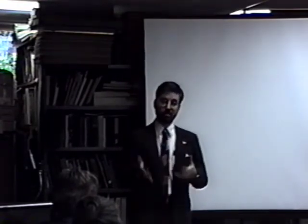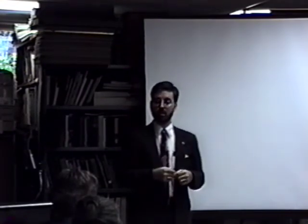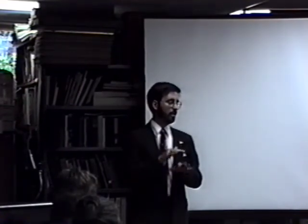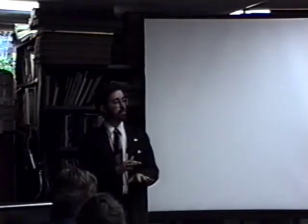the second floor. So at some point, again, we'll be able to stand on the first floor and look up to the third floor ceiling, or at least to the underside of the third floor. We won't be able to take out the second and third floors at the same time. The house will collapse. So it's going to be unique phasing for that demolition work.